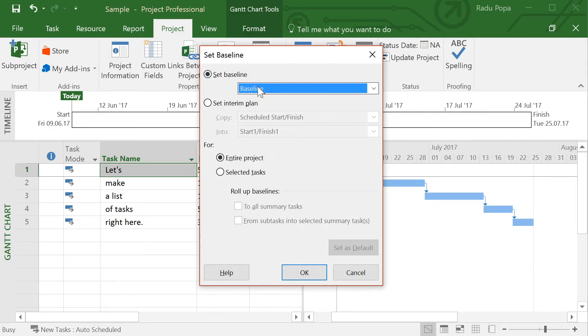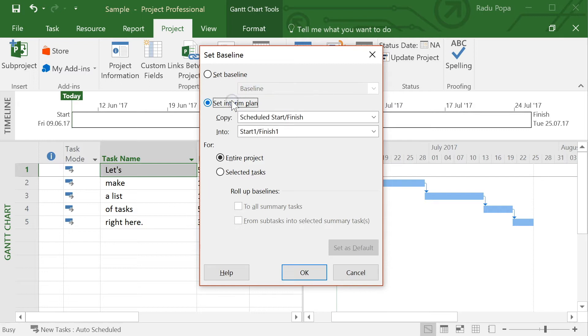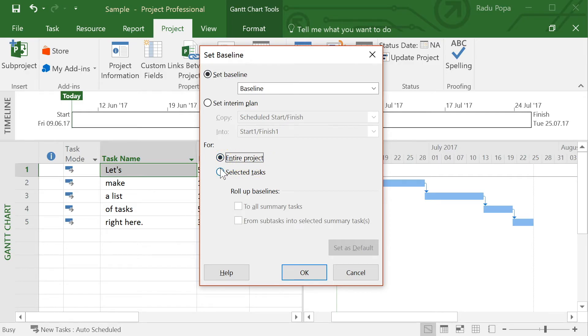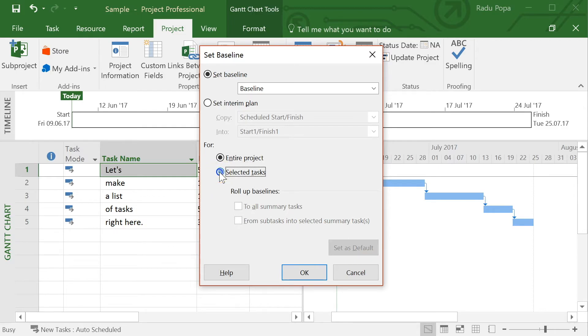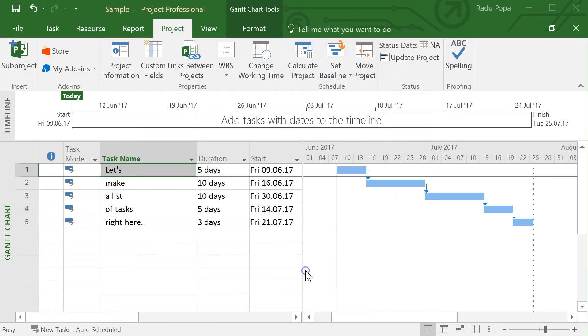I think 14, 16 variables and the interim plan will save only the start and finish dates. So let's set baseline and then I want to put it for the entire project. I can also put it on only the selected tasks. This could be useful if I have a very complex project with a million tasks and click OK.